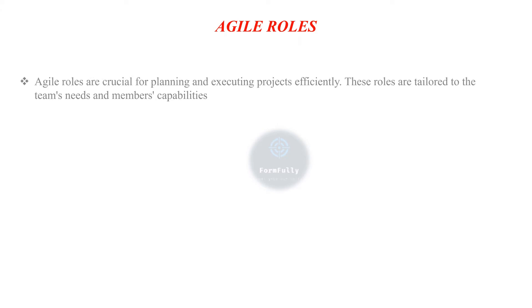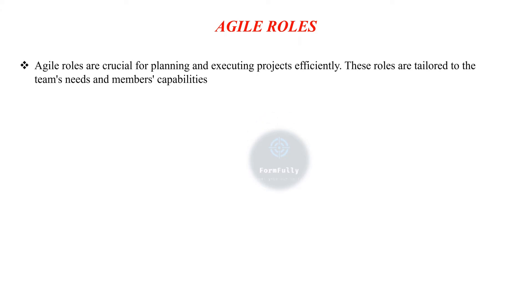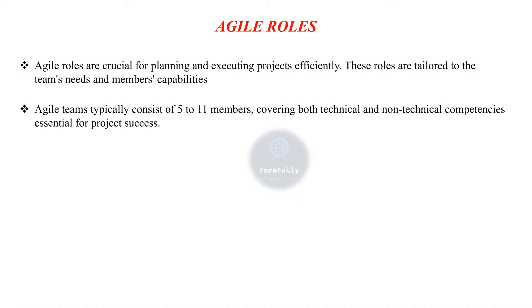The next point is Agile Roles. Agile roles are crucial for planning and executing projects efficiently. These roles are tailored to the team's needs and members' capabilities. Agile teams typically consist of 5 to 11 members covering both technical and non-technical competency essential for project success.